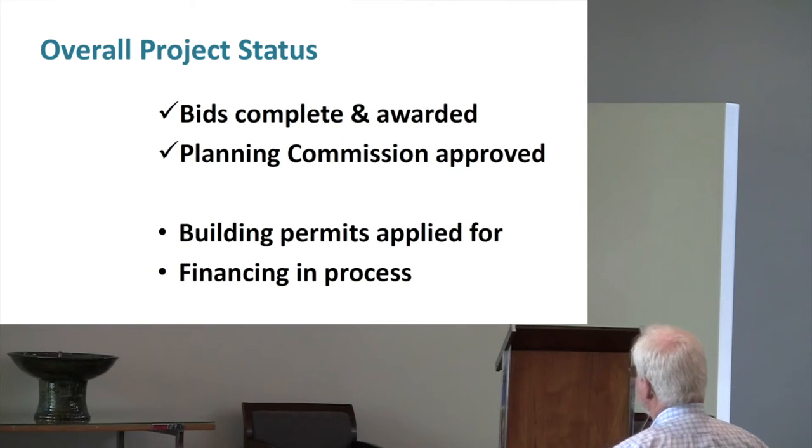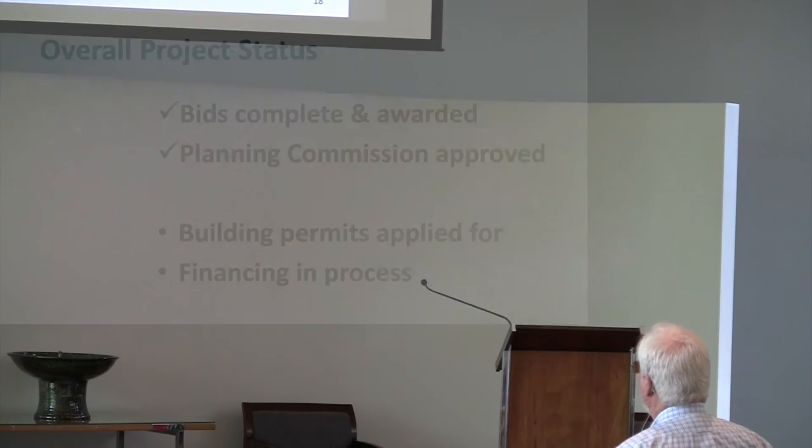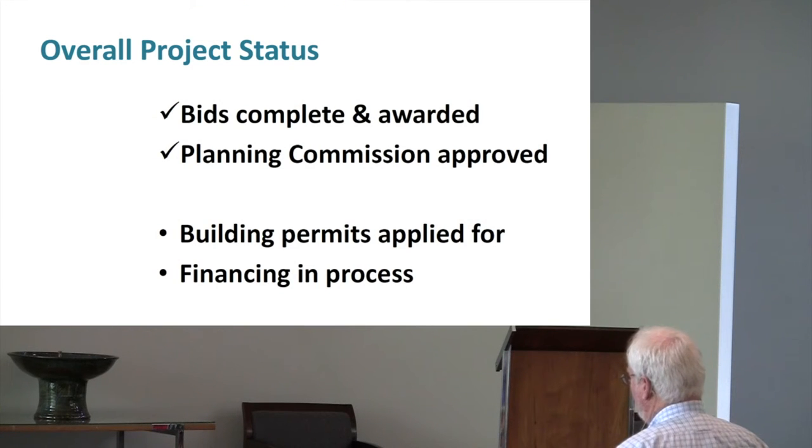And our financing is in process. We've been dealing with two banks and a couple of approaches. One approach is bridge financing plus an end mortgage, and another approach is to simply have a large line of credit for the total amount of the project and pay it off as if it were a mortgage, which allows some flexibility. We're not at the point where the board has approved exactly how we're going to do that, but we expect at the next board meeting to have them make the decision. Jim Shettle and I have spent quite a bit of time with the banks and think we have a couple good options. So